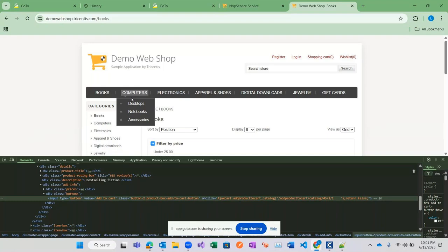Suppose the sprint duration is, sprint in the sense of how much time you are taking to complete the requirements. Based upon that only, we divide the work also. So the sprint duration, as we are following agile methodology, will be 2 to 4 weeks.